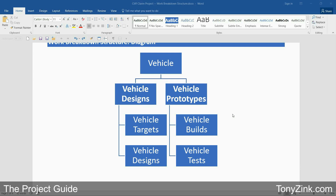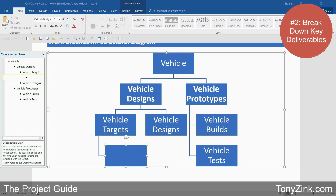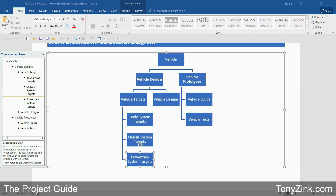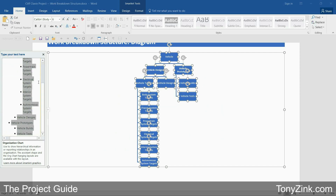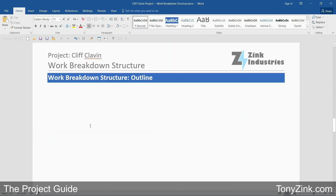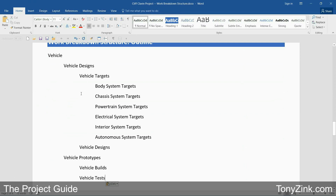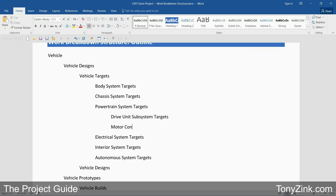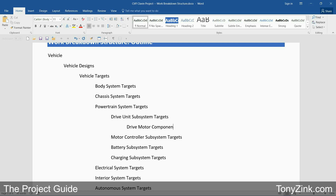Now that I've got a starting point for my WBS, the next step is to break down these key deliverables into smaller, more manageable ones. I'll click back into the smart art text entry box and for each key deliverable in the hierarchy, I'll add more entries to represent its detailed components. It can be a bit tedious to do this breakdown inside the small smart art text entry box, so I'll use another technique. I'll copy what I've entered so far, scroll down to the work breakdown structure outline section of the document, and paste the entries I copied from the diagram. Now I've got the same set of deliverables, still organized in a hierarchy, but in a format that's a lot easier to work on. I can continue breaking down each key deliverable by indenting one level further into the outline structure to add smaller components at that deeper level.